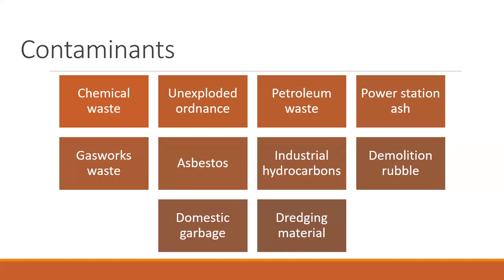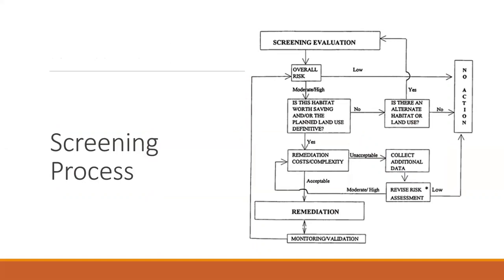Once the preliminary assessment has been conducted, the exploratory and detailed site investigation can begin. Next slide. In 1991, a study of the site was conducted in which boreholes were drilled in a 50-metre grid to an average depth of 1.6 metres. A screening criteria, shown here, was implemented to separate areas of high risk to human and ecological receptors and those that were negligible.